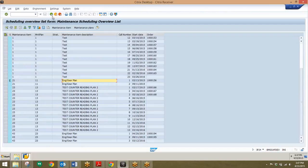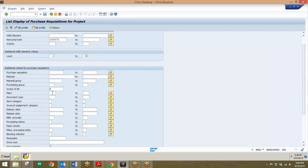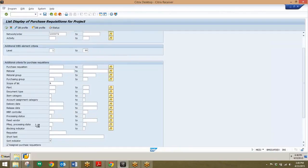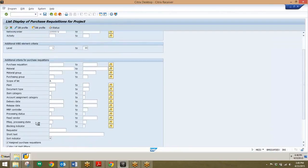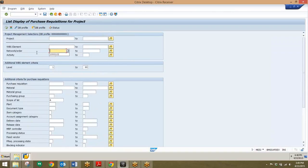The project purchase requisitions transaction code is ME5J. This will allow you to look at purchase requisitions per project, per WBS element, or throughout any of these other different criteria. We can look at different PRs by plant, document type, etc. For this, I'm going to run this open again, so I'll delete this information that automatically populated the fields. If I wanted to, I could look at a particular boat or barge, but running this wide open I'll look at all of the purchase requisitions within the system.